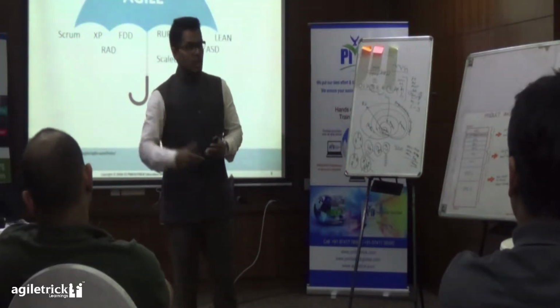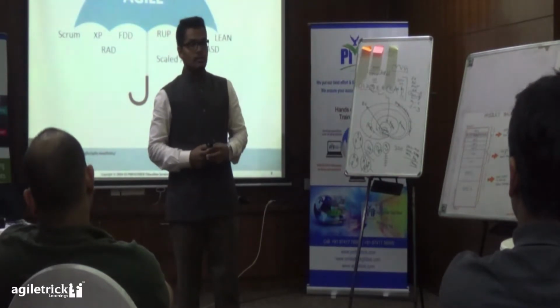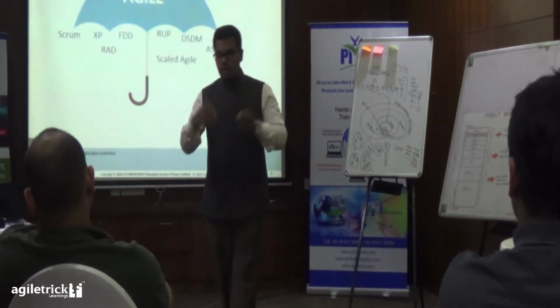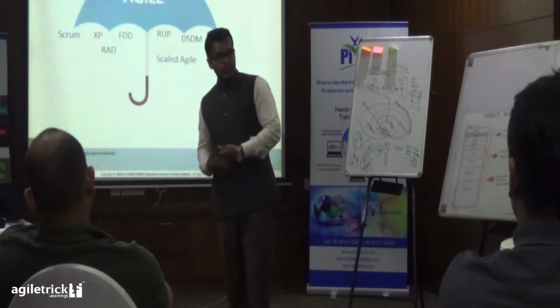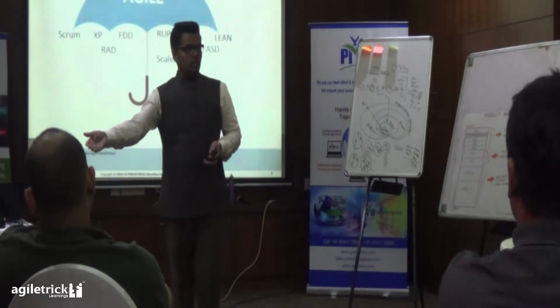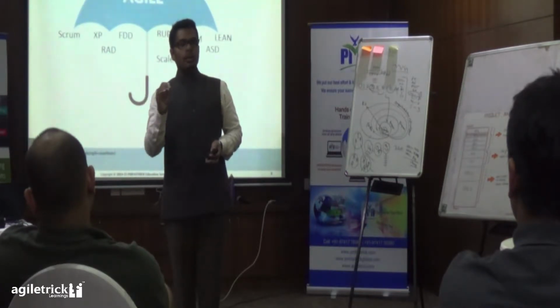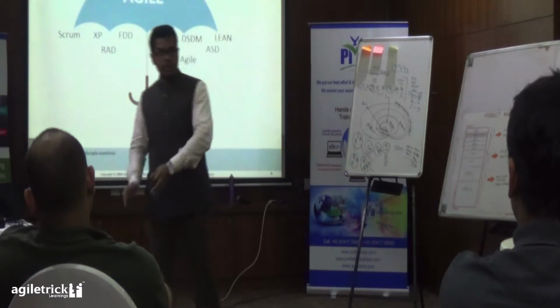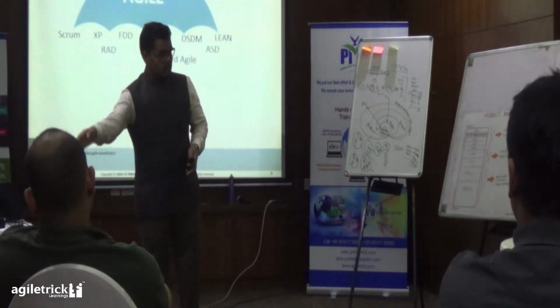Who are the different stakeholders? Who is the business owner? Who is the business analyst? Who is the business sponsor? All this detail I will convert into a CR template. Once it is done, I will upload it into the tool. And inside that CR, I will say I need the scope change, the schedule change, the milestone change. I will copy all sorts of things, make a formal document, and upload it to SharePoint.